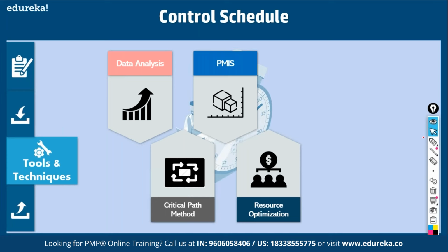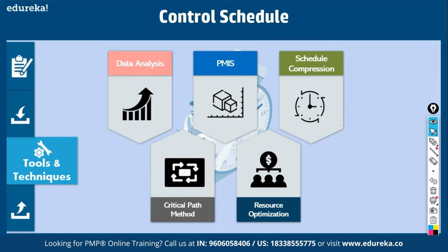What is resource optimization? For example, I told you John might be allocated 16 hours of work. So you make sure he does it in 2 days. That is called optimization. Fine. And what happens in this process? Just a moment. Schedule compression. I told you fast tracking, doing activities in parallel, right? Then leads and lags can be employed. Lead will have the effect of advancing an activity, right? If you advance a successor activity, it'll reduce the duration of the project, isn't it?